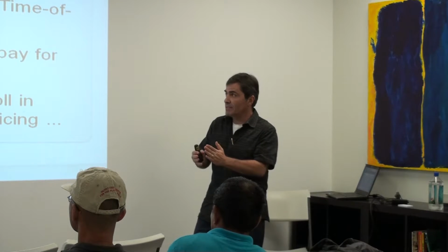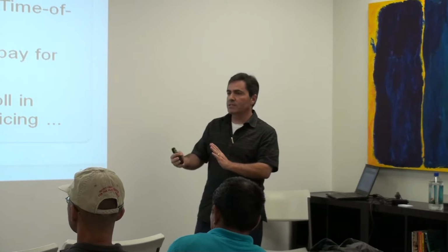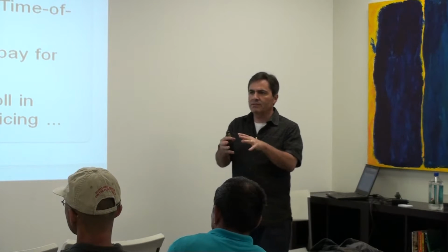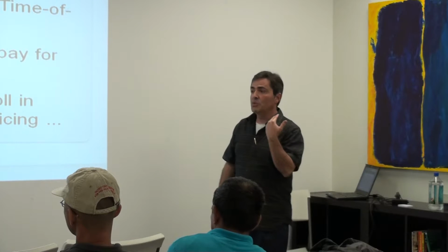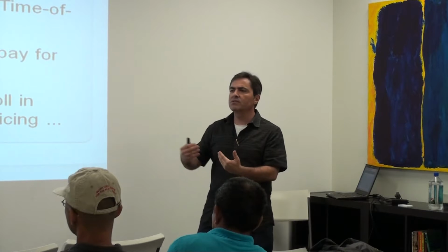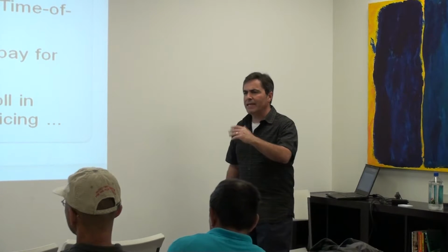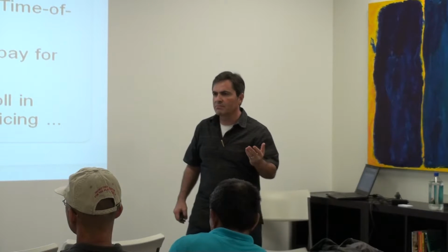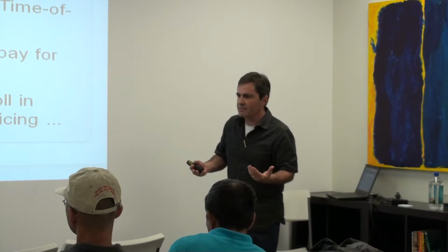So one way to deal with it is, okay, let's split that into what's the simple part of it and what's the major effort. And then we can do the small effort first. Maybe the user story is, hey, we're just going to collect the input. We're not actually going to do the transaction. And usually when I tell people this, they say, hey, I thought the user story was supposed to deliver some kind of value. But if all you're doing is collecting the information, you're not providing any value.